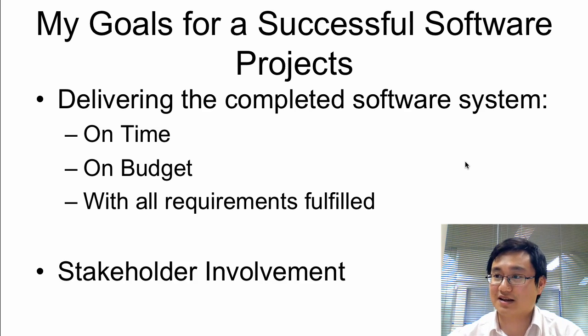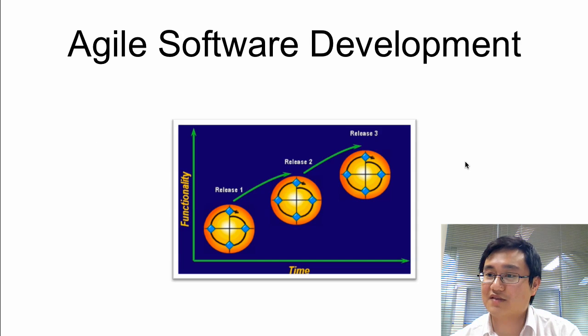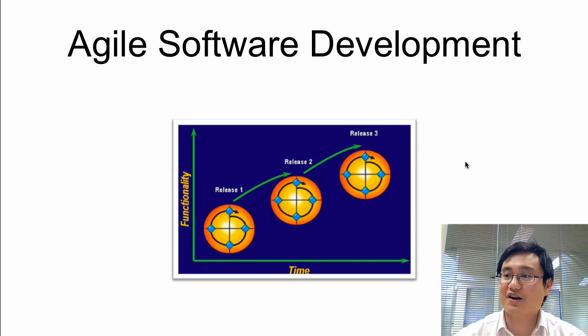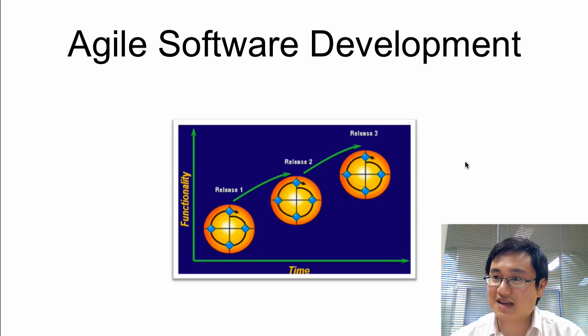Without going into too much technical detail, Agile software development is where the development of a software system is broken down into a number of mini or micro projects. Each of these mini projects produces tested and functioning features, which are a subset of the overall system requirements. The process is then repeated until the system is completed. The advantage of this iterative approach over a more traditional waterfall method is that it produces fully functioning system components earlier, which in turn allows the stakeholders to review functioning components at an early stage of the project's life, and subsequently allows change requests to be made earlier on.